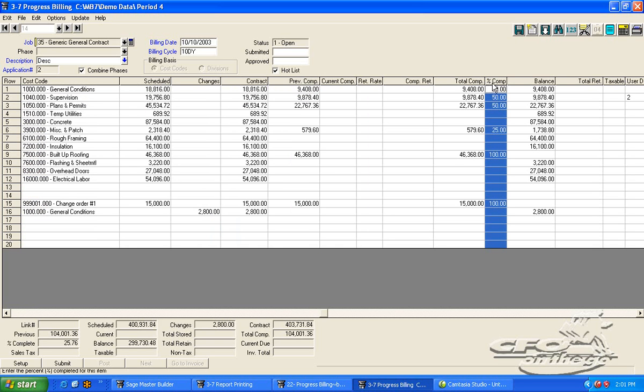And here's where I have percent complete. And as you can see in the previous billing, I just entered percent completes to bill rather than entering amount, which I could do. Most people do just like the even percentages, and so they'll either be 50, 60, 70, 100% complete. At this point, this bill is ready to print. I just want to run you through that.